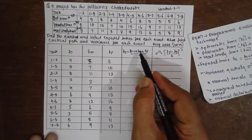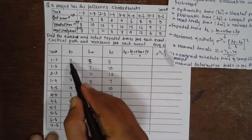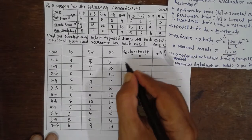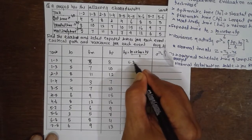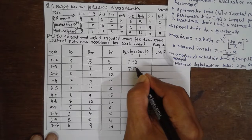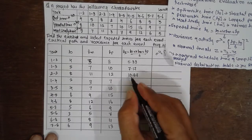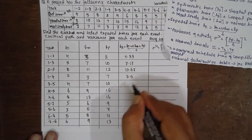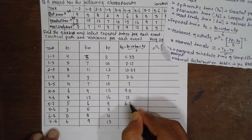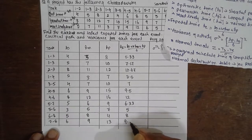To obtain the expected duration Te, substitute values in the formula. For example, (4 + 4×5 + 8) / 6 = 5.33. The Te values are: 5.33, 7.17, 10.67, 3.57, 9.5, 12, 6.33, 5, 8, 9.17.